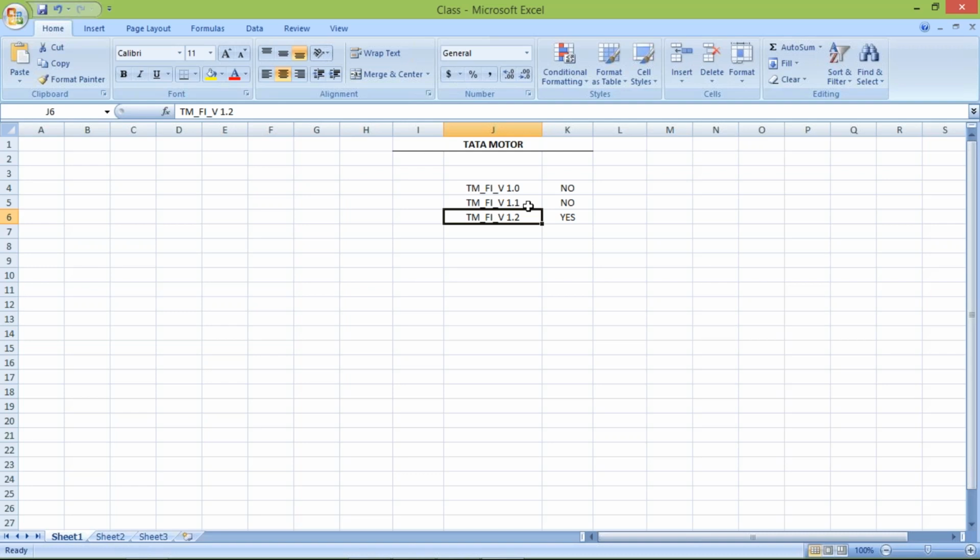Here we freeze all the requirements. It means from today onwards, no new requirement will be considered by us. Whichever requirements you have given till today are accepted, and we have already documented them. Tomorrow onwards, if you come up with a new requirement, we cannot accept. Why? Because we must complete the project within the deadline, right?